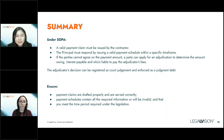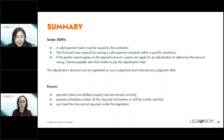The determination can be registered as a court judgment and enforced as a judgment debt. Some common mistakes we notice in clients' payment claims and payment schedules include: payment claims not referencing the SOPA legislation, not identifying the works for which the progress claim is made, and not being served on the correct recipient. We also frequently see payment schedules not drafted properly — for example, failing to include the amount agreed to pay or the reason for agreeing to pay a different amount.